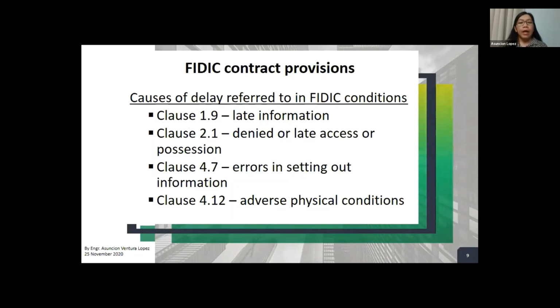Now, in the FIDIC, there are clauses related to this, and you can pinpoint which clauses are referred to, for example, late information. A time extension request must always be concise, and you have to reference it to a contract clause that would allow the request, provide proof of the delay for a reason, and then propose a recovery plan.